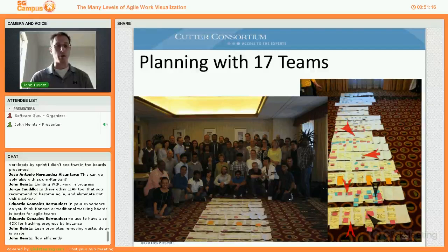With many of the teams that I work with, the flow efficiency tends to be lower, between 10 and 25%. If we're looking at a lean tool that can help us remove waste in our system, go faster, better, smoother, and easier, I would say that flow efficiency is a tremendously useful metric to track. All you're really doing is asking how much time we spent actually working on this versus how much time it took in total to progress through our system. That would be a tool that I would recommend.